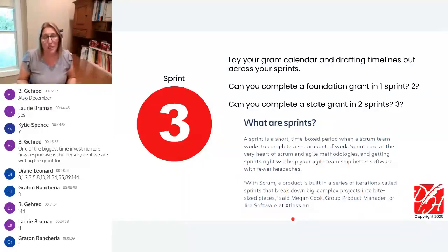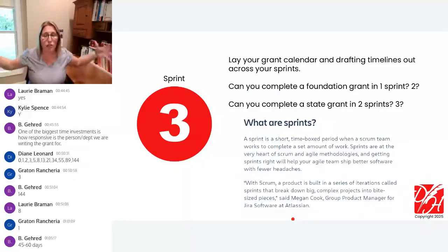Most folks are not doing the extra large applications in a period of something like 1 week. Even if you're like, actually, if I checked my time, maybe it took 42 hours. But if there's too much back and forth with other folks and we're getting information, the process of the back and forth and the wait time in grants is 45 to 60 days roughly for that big $20 million one. So we need to think about what are the steps and where do we want to have our application progress to within our larger timeline.